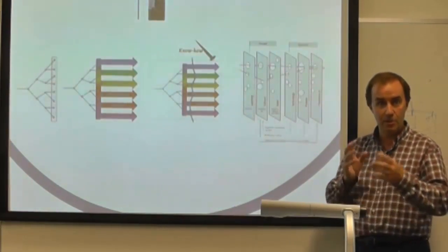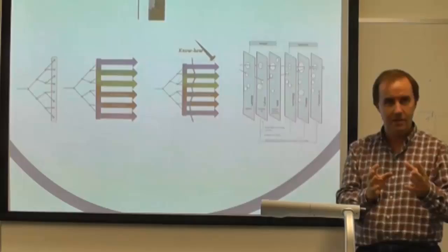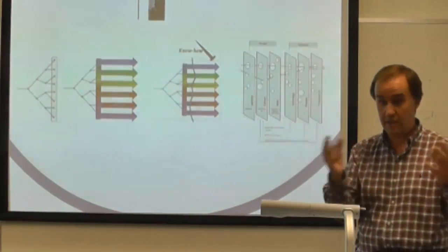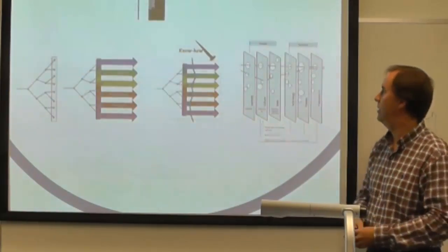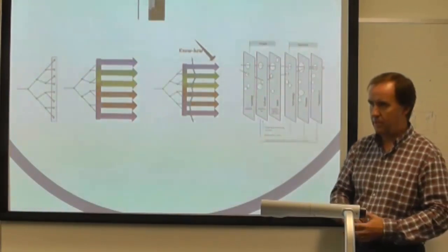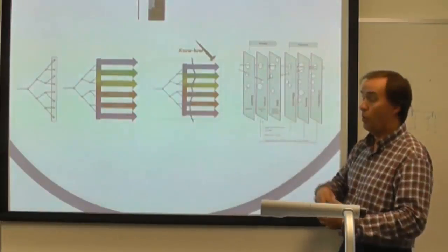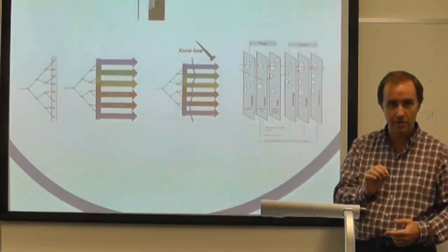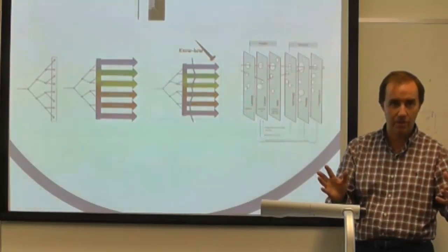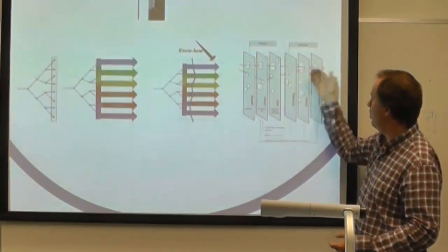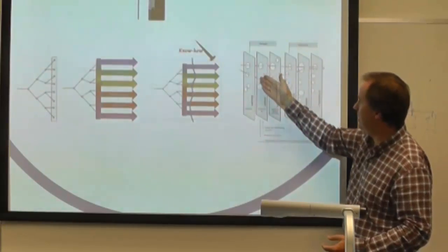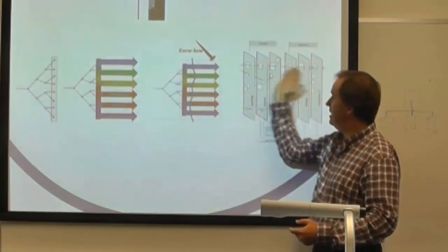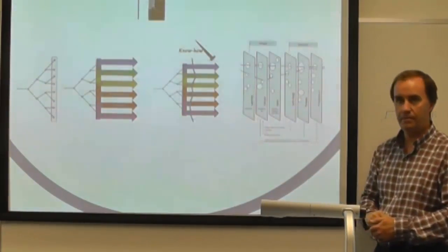Okay? So this is what the lessons learned thing is. If you had a lessons learned activity, let's say it's a debriefing or a way of flagging problems, you also need people who have the power to make these changes, because it's pointless just sitting there talking about this. They can go in and make changes to these particular parts, these particular systems, to make sure that they enable that practice to happen.